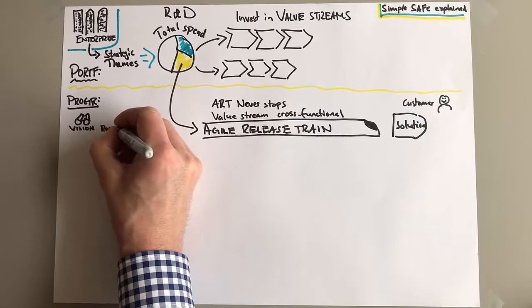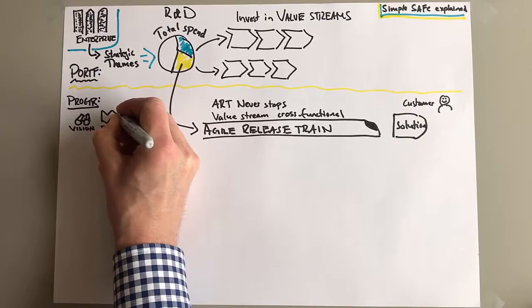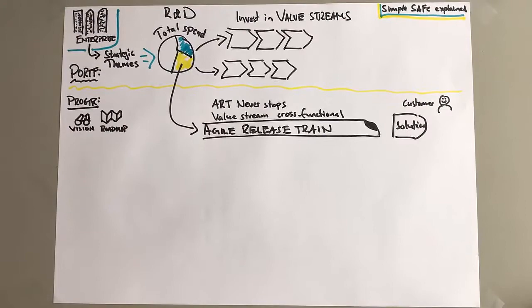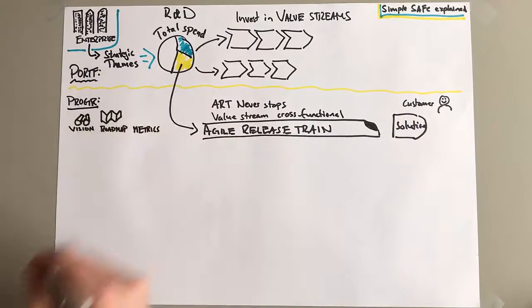And on the program level you also have of course a vision, really important for the context. And you have a roadmap, and the roadmap would be three to five quarters, something like that, out into the future. What do we think? What features are we going to deliver to our customers?